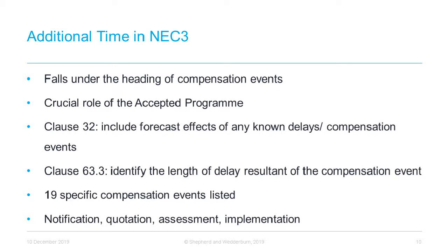In contrast with JCT, under NEC, all time and cost events are referred to under one broad category called compensation events. The concept of the accepted programme, which we discussed earlier, plays a very significant role in additional time claims in NEC contracts. Submitting a revised programme does not in itself constitute an application for an extension of time.